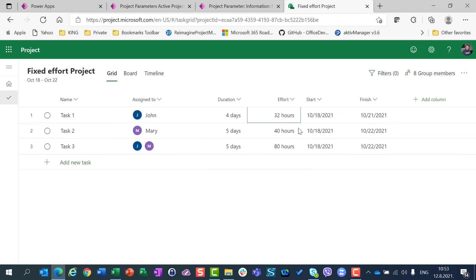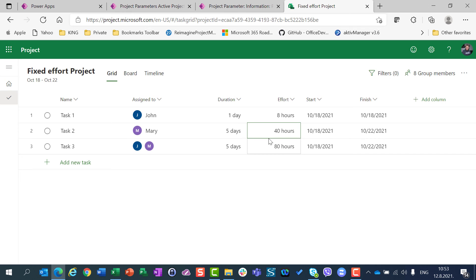What if I change the effort? If I change John's effort from 32 hours to only 8 hours, the duration will change as well. Since John works 8 hours per day and only needs 8 hours total, he will be done in one day. But if I say Mary needs 80 hours, since she works 8 hours per day, 80 hours means she will work 10 days. You get the picture.